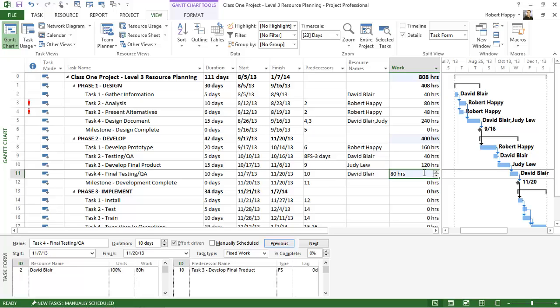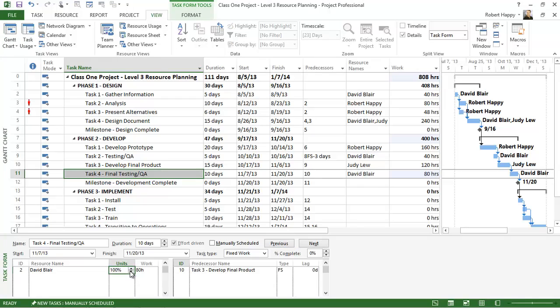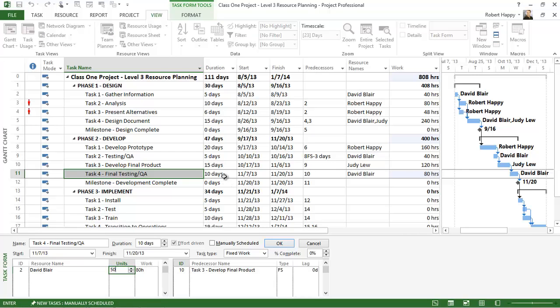I want to make a change to this assignment. For example, if I change David from 100% to 50%, what's going to happen to my work value? Well, nothing, because it's going to stay at 80 hours, so what's going to get recalculated is my duration.